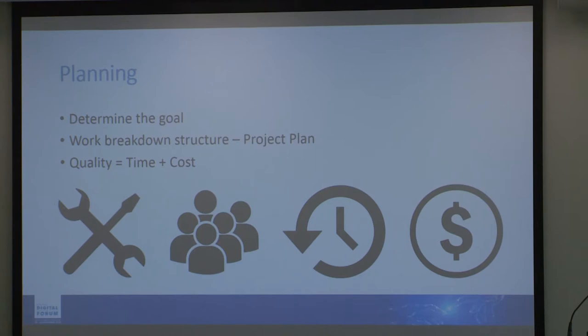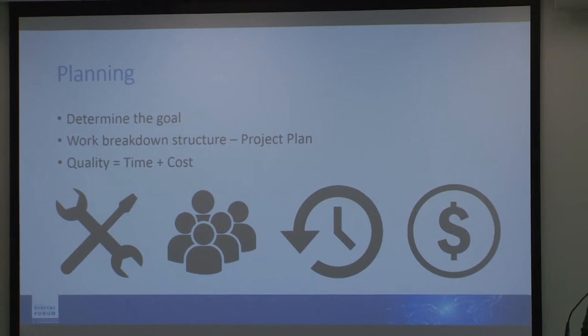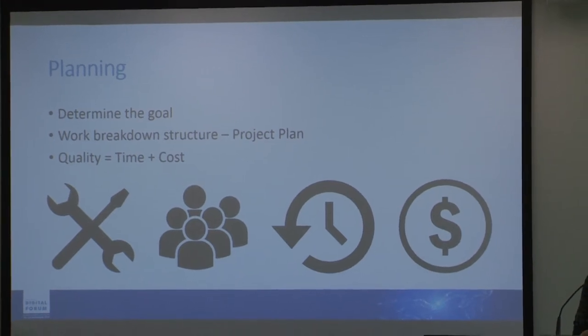and budget, and then turn that total scope of the project into smaller and manageable tasks based on size, costs, duration and responsibilities. What has to be done in order to get from A to B, and estimate how long each of those tasks will take and how many hours they will cost on people and equipment.